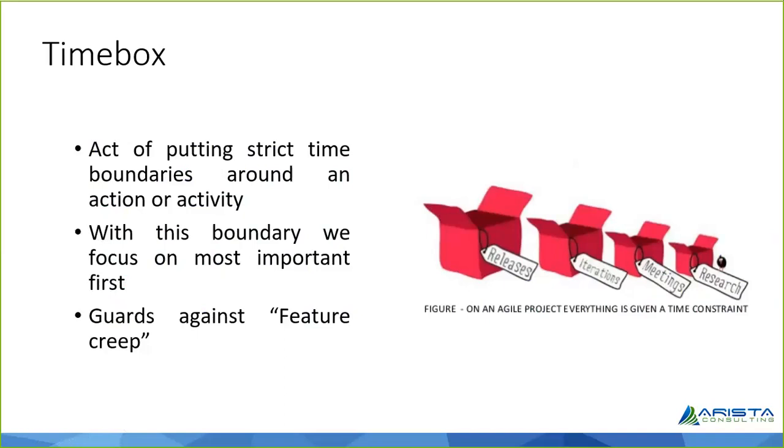Similar here, you have delivered 6 or 7 things. You have delivered 7 items out of 10. And your time box of 1 month is over. That's it. So you can deliver only 7. You can't say, okay, for this 3, I need additional time and maybe in next 2 days I'll complete that. No, you don't get that. So what happens to the 3 items that you did not do? Because finally, in the exam you can fail, you can reappear. In the project you can't do that. You don't do a project to fail. You always do a project to succeed.